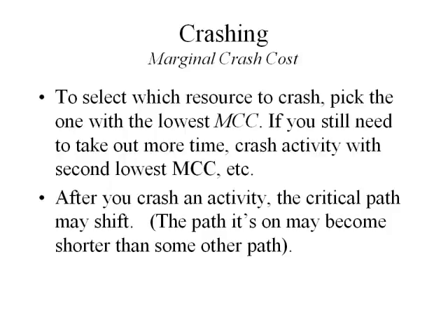You do have to watch sometimes that when you're crashing, your critical path doesn't shift. You may crash your critical path so much that your critical path goes someplace else. But let's assume that you've got that under control. You understand that, and your main consideration right now is just figuring out which activities do I want to crash.